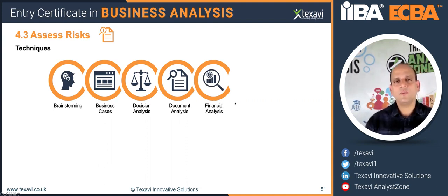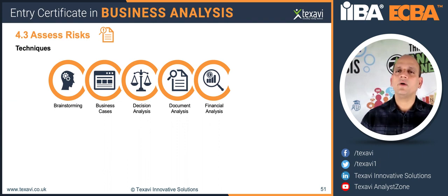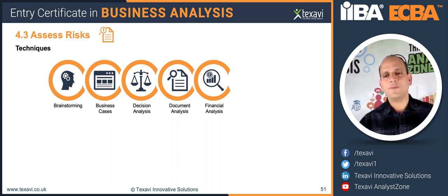Financial analysis, obviously, that's where risk actually has its roots. Very important to understand what are the potential risks involved in the aspect of carrying an investment. It could be again going down to the business case, investment option A, option B, option C. What are the potential likely payback, and what is the kind of discounted cash flows, and what is the return on investment across these different three options, for example. And then you can take a better call in terms of which one works out the best, considering the break-even periods, the payback, and the return, and then the discounted cash flows, and all those different financial analysis options.